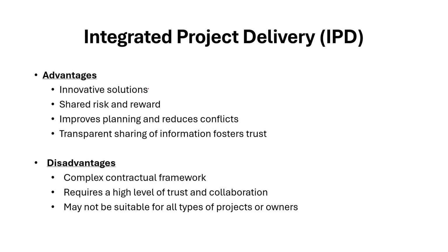The main disadvantages of this project delivery method would be that multi-party agreements and collaborative planning require significant coordination and trust, so it increases the complexity of the project. There will be a shift from traditional adversarial relationships to collaboration that may be challenging for some participants. So it really requires a high level of trust and collaboration. And setting up the IPD framework can involve higher upfront expenses. So it may not be suitable for all types of projects or all types of owners.